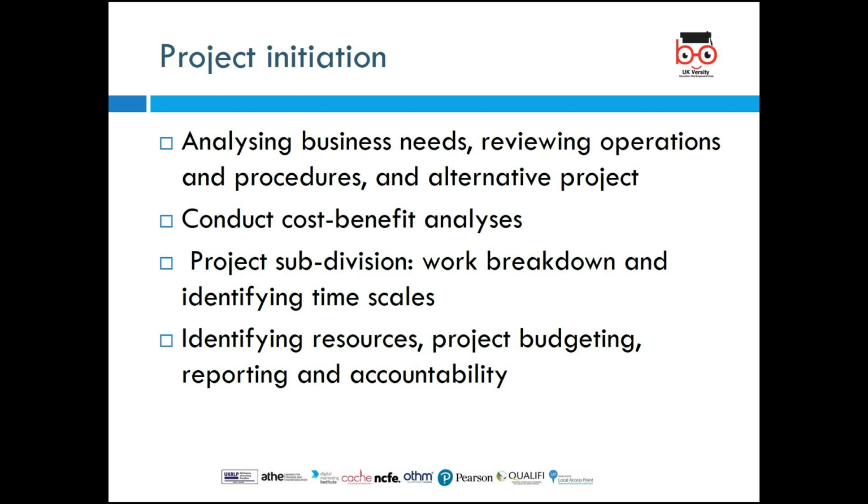So if you have three possible projects, like allowing staff to go out at break time to buy food, building a canteen and supplying the food yourself, or outsourcing a catering company to come and supply the food, if you look at these three alternatives, conduct what is called cost-benefit analysis and look at what is the cheapest alternative and what is going to benefit staff at the hospital. And then you think about your project subdivisions.